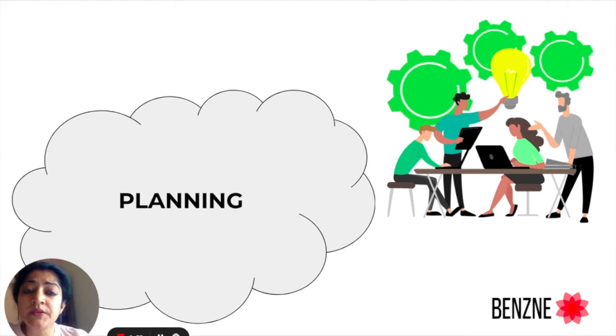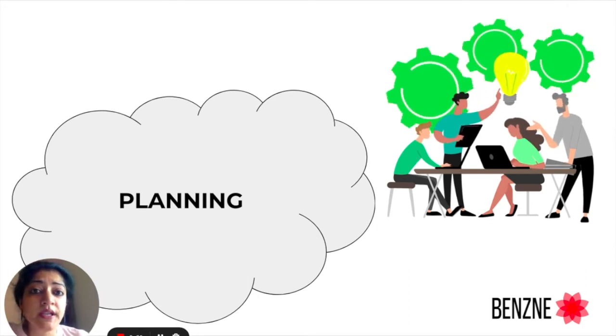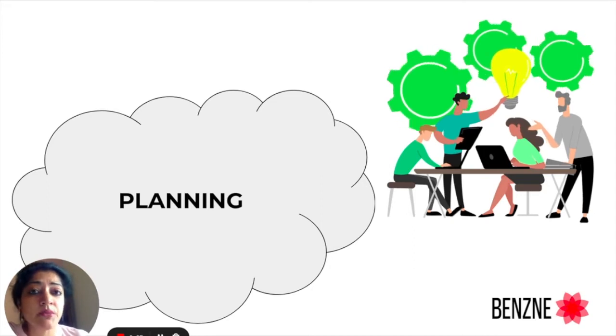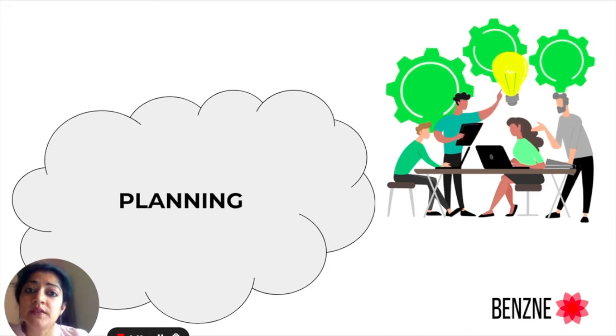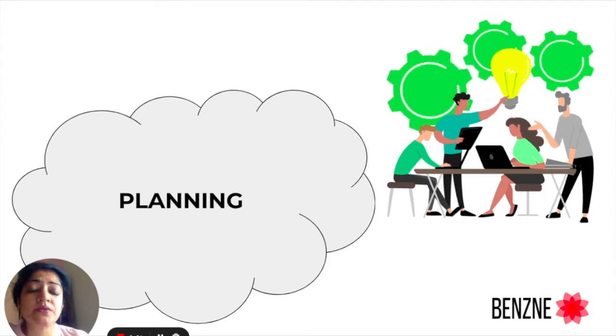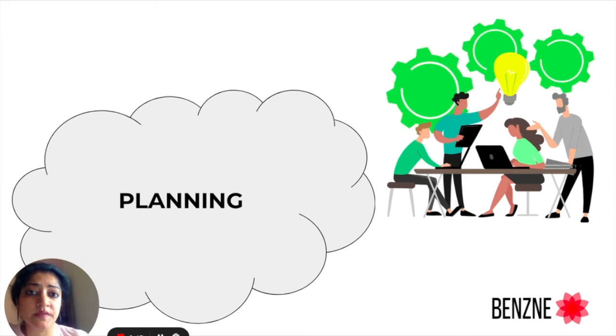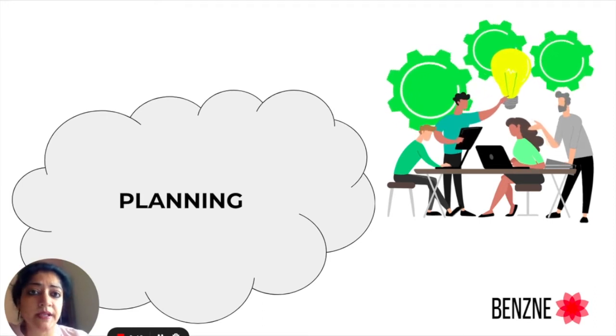So, our go to mantra is plan, do, check, adapt, communicate continuously. Another point is do not plan in detail, plan only up to foreseeable future. Now, when it comes to user stories, do not plan granular level of user stories, leave them for sprint planning.